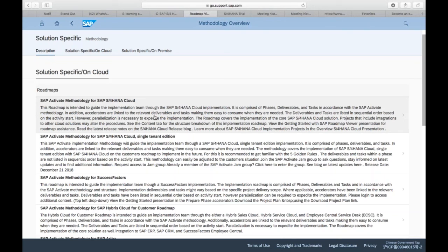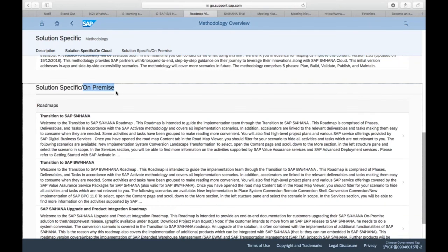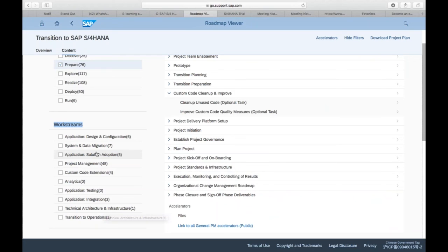So you can see within the discover phase, it starts with strategic planning. Obviously, discovery means the customer wants to discover how SAP can help them. So before they think about SAP, they need to understand their strategic planning, whether they are planning to implement ERP, whether they want to go for tier one applications or tier two applications. Those are all the strategic planning. Second, they will decide on the scoping. So whether they want to implement SAP S/4HANA only for finance or only for procurement. In short, what are the modules they want to implement, whether they want to go for hybrids, or SuccessFactors. Those things will be done during the discovery phase itself.